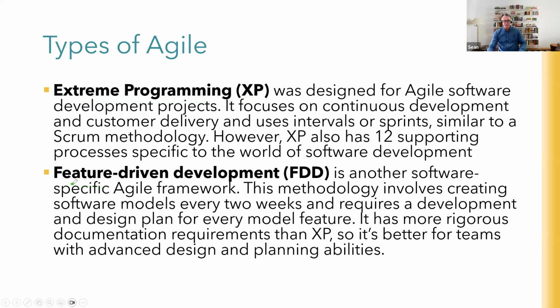Feature-driven development, or FDD, is another software-specific agile framework. It's again focused, it's got time boxing of every 2 weeks, and you churn out the software within that time. It's known to be a bit more rigorous around the documentation requirements than XP, so it's better for teams that appreciate that extra level of detail with design and planning as well. So even now, you can see different agile approaches take those principles and those foundation elements slightly differently. So FDD does value more process and documentation than, say, extreme programming as well.